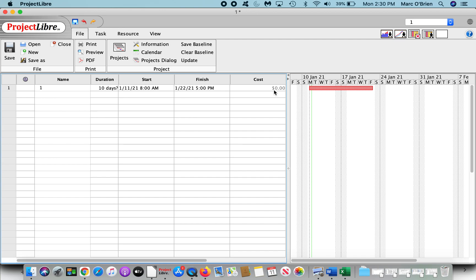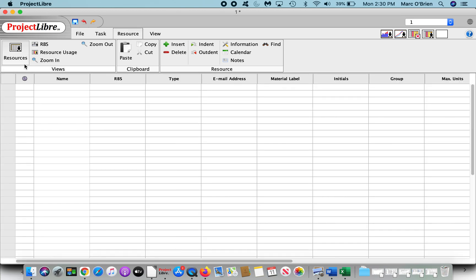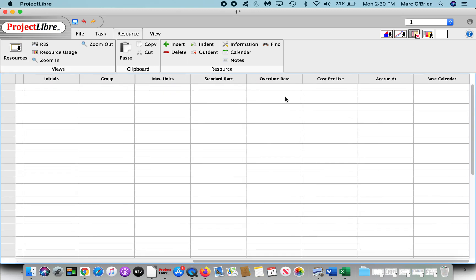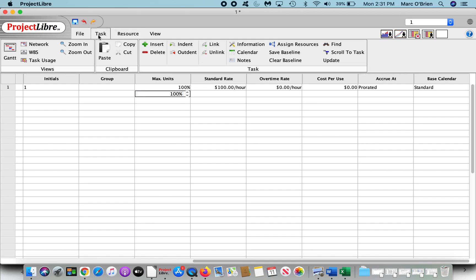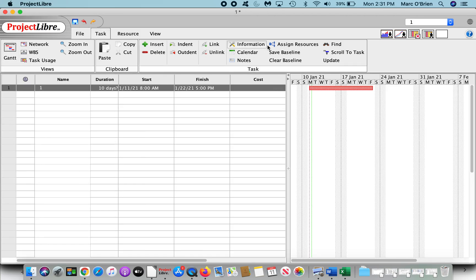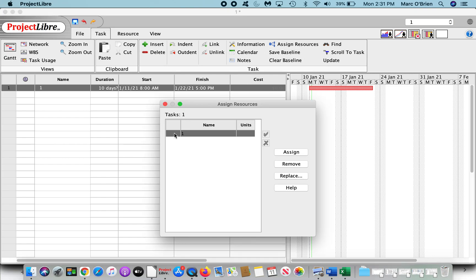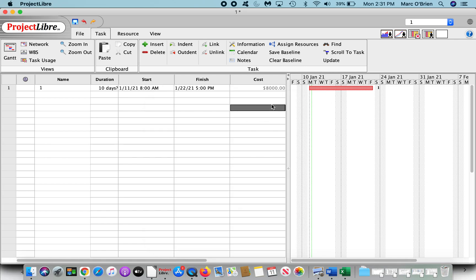And you can see it's with the dollar and zeros. If I go to Resources and go to the Resource Pool, I'll also name that 1. And I'll scroll over and say the rate here, you can see it's dollars per hour. I'll say $100 per hour. Go back to the task, and I'll assign that resource. So if I click on this task, Assign Resource, Assign 1, you can see the cost. It's $8,000. And it's in dollars because of that.